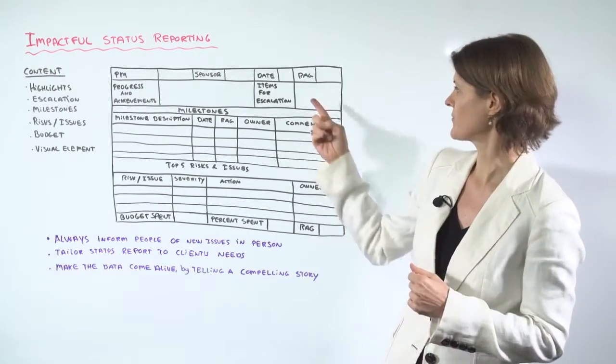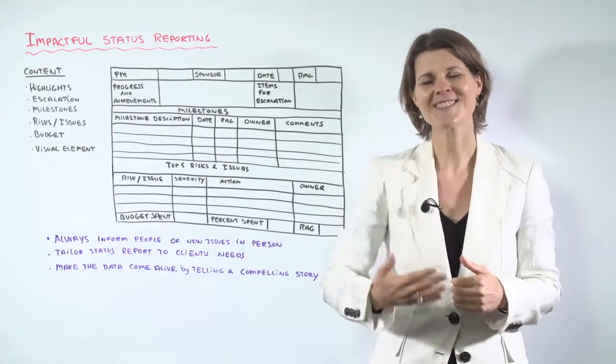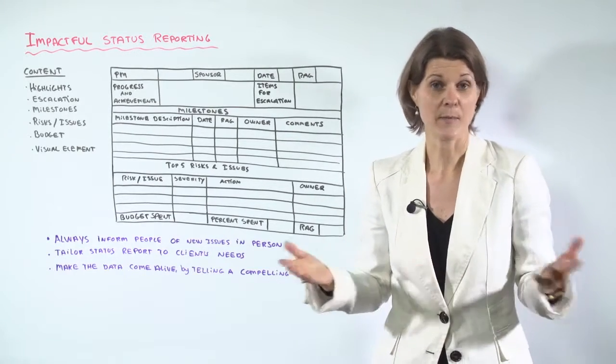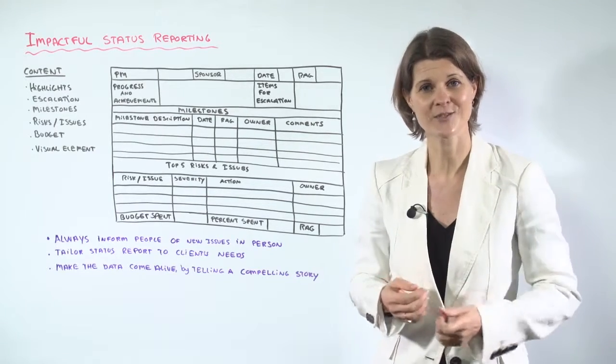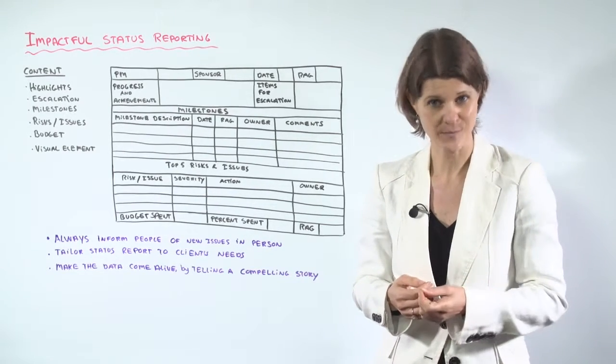And then here on the right, items for escalation. You see you have a senior audience. There may be senior executives reading your report. So why not take the opportunity to tell them what you are waiting for from them.